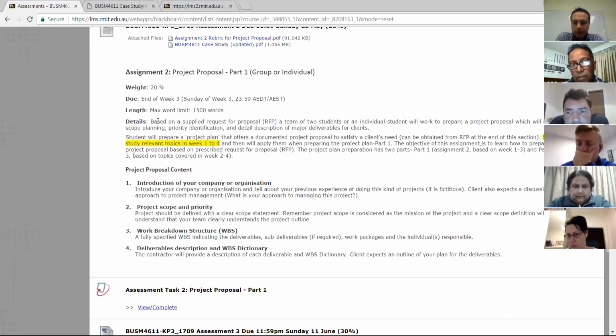Yeah, I think we will have, of course, another purchase order which is back to back with them. And for our company, in your time schedule or your WBS, you will need to put some follow-up activities. Also, once this product is delivered, you will need to do inspection. There are points in the RFP that they have already mentioned, and you can find them in